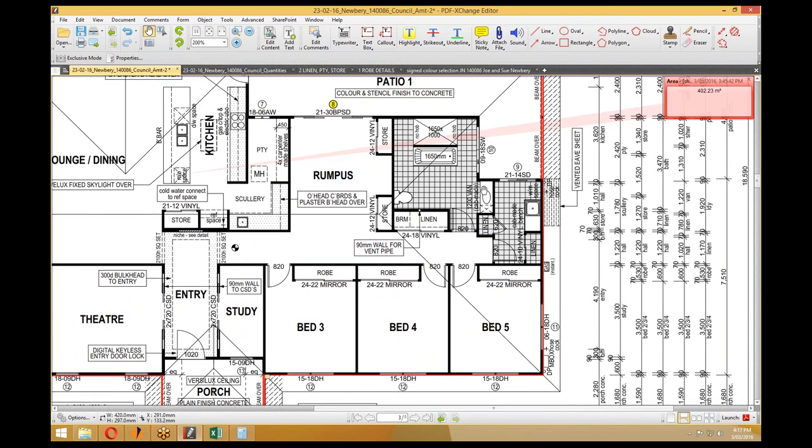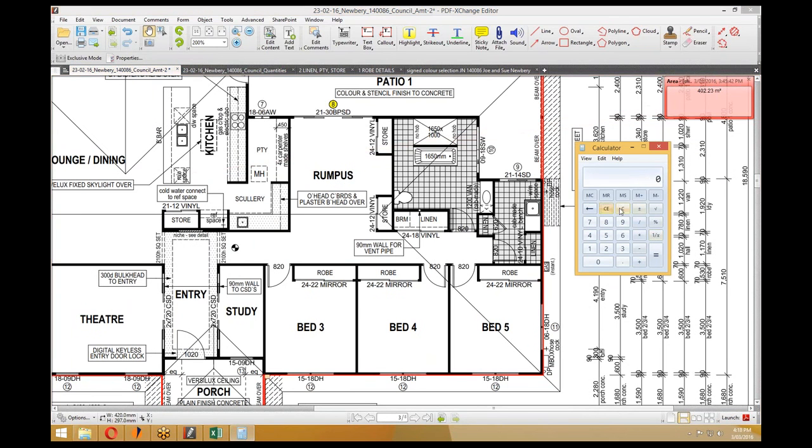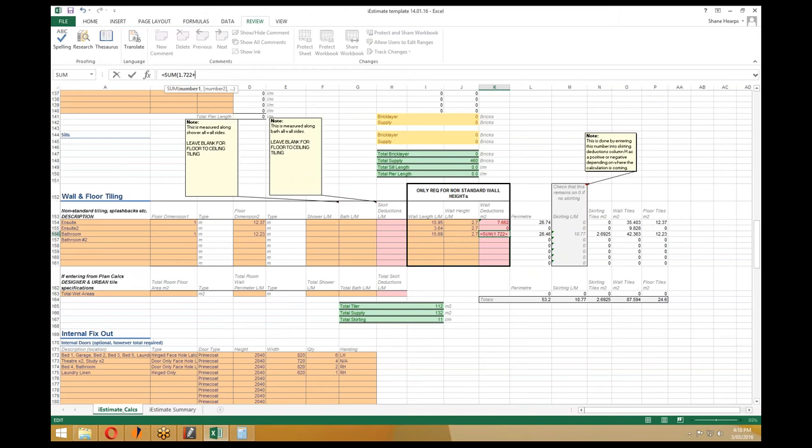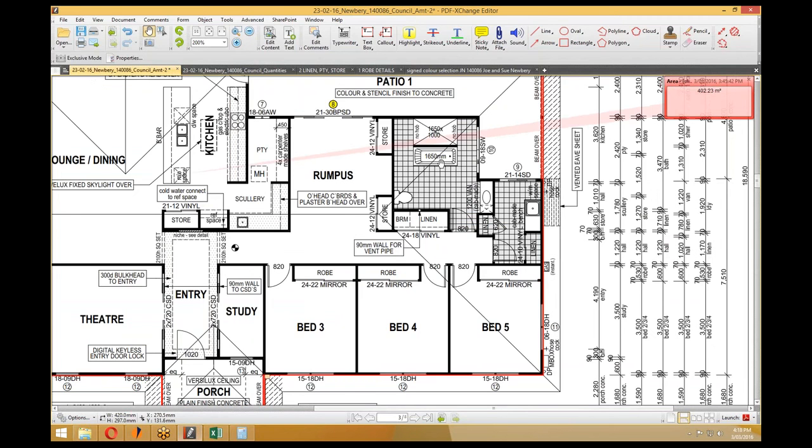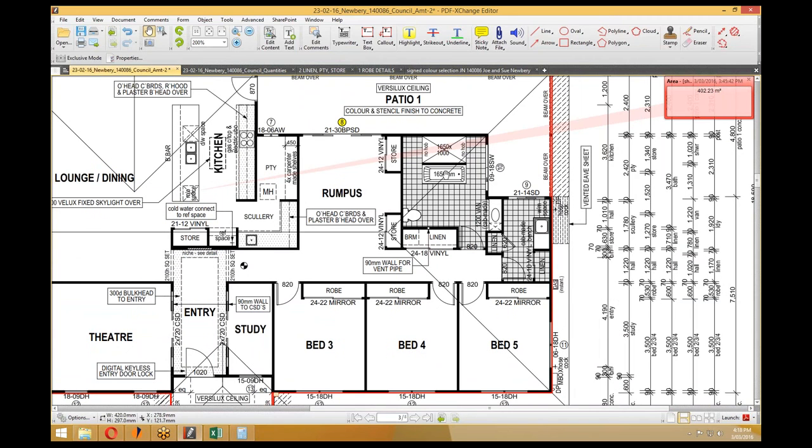and we can take out the vanity, so which would be 0.5 plus 0.9 by 1.2, 1.68 plus. Now you wouldn't take anything out for the bath, because essentially what you're not tiling on that wall will be tiled on the front of the bath, but we will have to allow additional tiling to the two sides here of the bath.